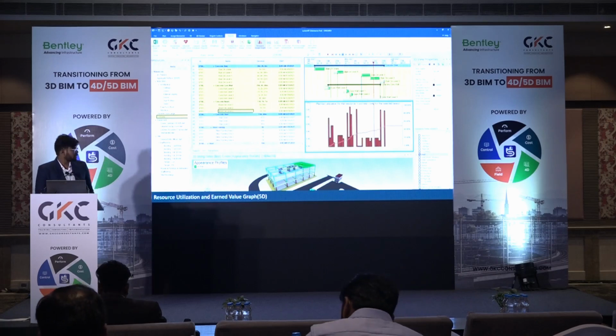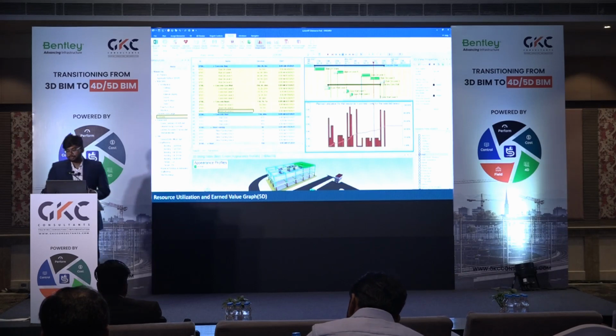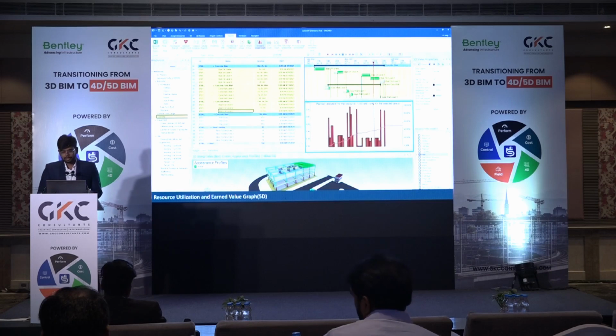So here we can see the daily concrete consumption, and we can see the cumulative graph of consumption, and maybe for some other resources you can see that the total available resource is this much, and exactly when the cumulative consumption is exceeding the resources which are in your reserve. And from that point you can start planning how to bring in extra resources.